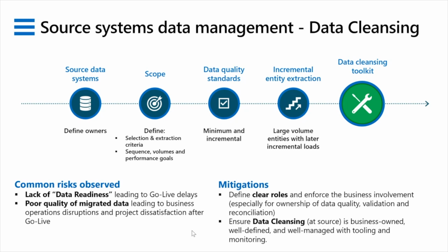So what does it mean, for example, if you're taking customer records over? What does it mean for a customer record to be clean? Right? What is the minimum data quality it needs to meet in order for you to even extract it and take it through the data migration engine? And it needs to be quite tough in terms of these standards, because of the amount of time projects waste trying to clean up data in the engine at the target system, when it's most often much better to fix the problem at source.